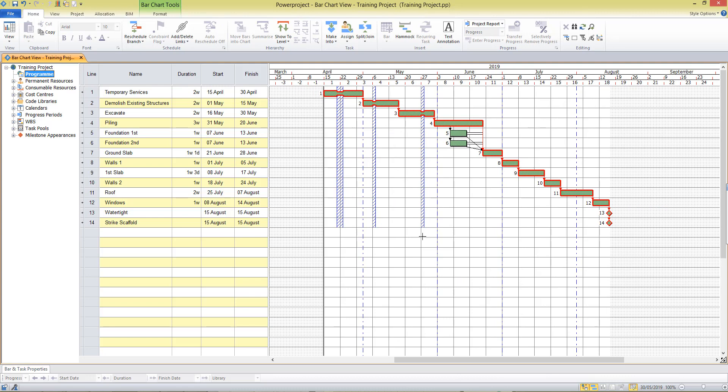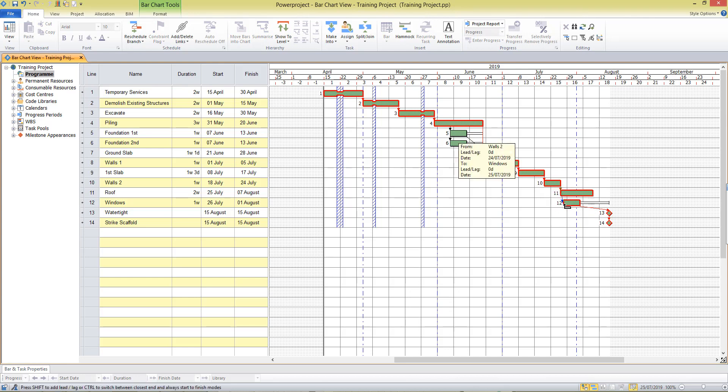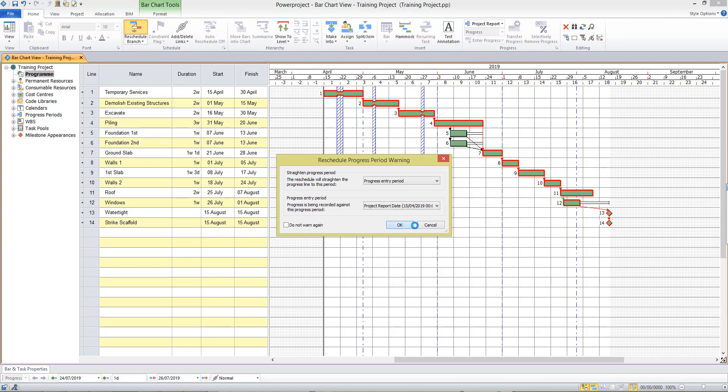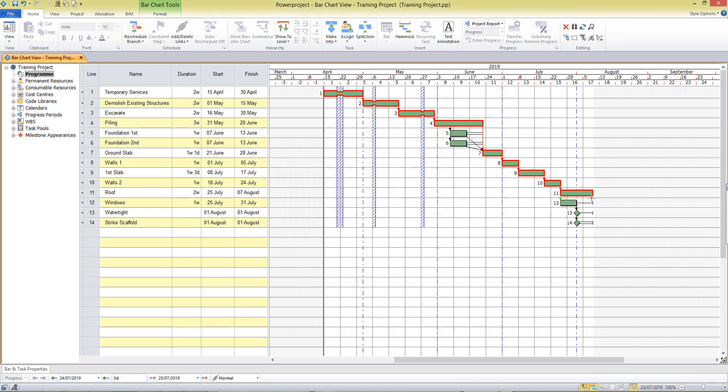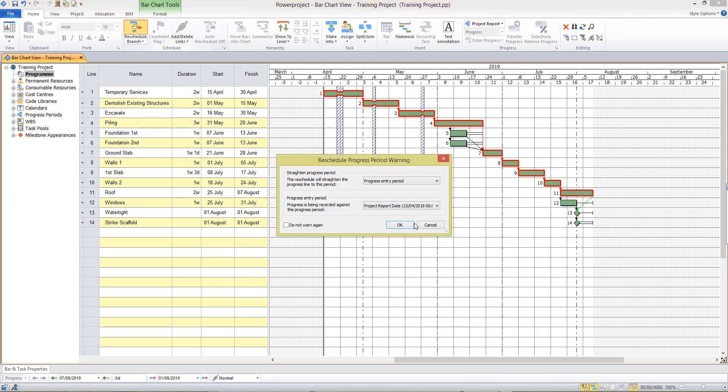What I also want to do then is I'll maybe move the date of my windows activity back so I'll remove this link, I'll delete this link from roof and instead I'll put a link in there from my walls activity. But I need to tie in my water tight dates to the completion of roof there.